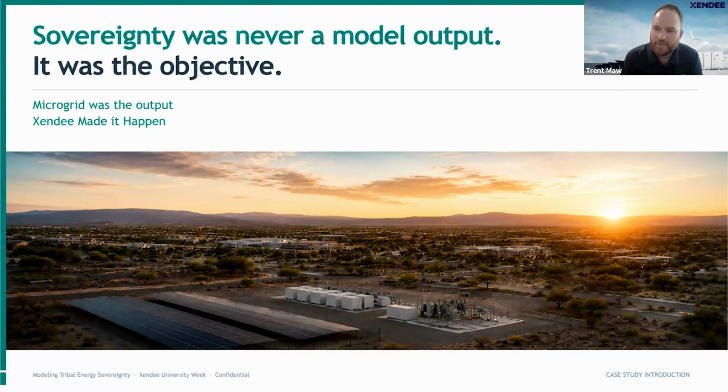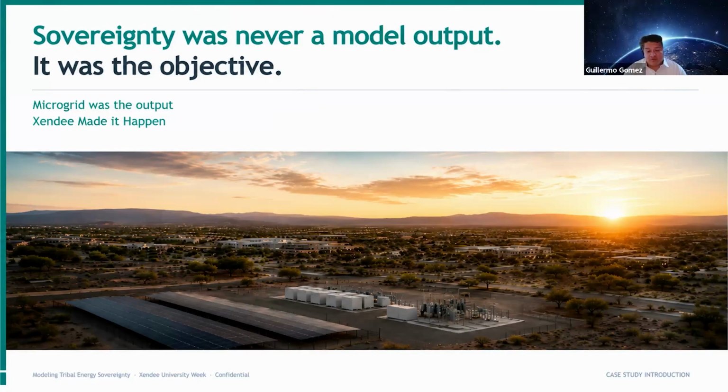Okay, great. Did you experience any supply chain issues? And how did you manage those to keep the project on schedule? Absolutely. We're dealing with supply issues right now. Just having to get a cogeneration engine, we were able to get almost a 2 year lead time on that. But what we're being told is, if you try to get one now, you're looking more at 3 or 4 years. With the switchgear and the engines, there are definitely supply constraints.